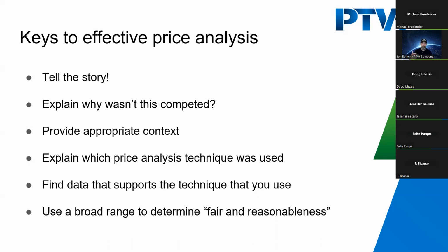So again, if you're not doing a competition, you're not getting an old invoice from them that validates the prices that they paid, you can't get the parametric estimate, they don't have a competitively published price list, then what I do is the independent contractor estimate, and I will get into some of those tricks a little bit later. They're getting close to that now. So find the data that supports the technique that you use.